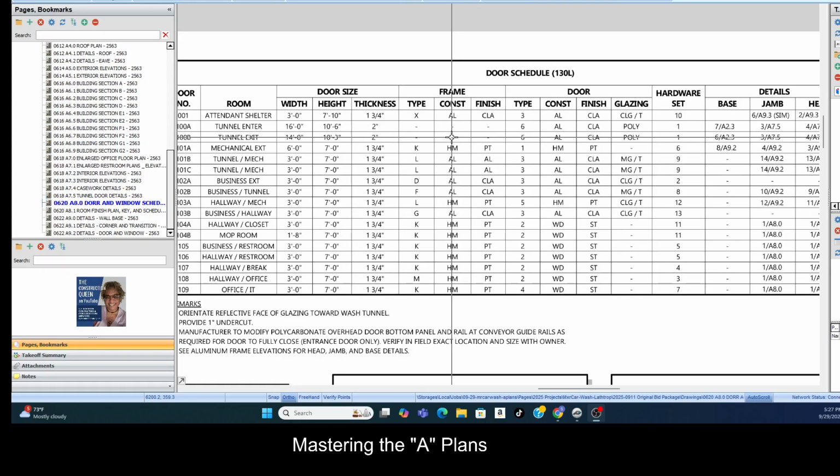If I'm the painter, okay, if it says paint, I need a cost to paint the frame, because that's a linear man-hour number when you're doing frames and trim, and there's more labor involved in that as opposed to just painting the door. And so yes, you need to know the frame length, right? Both sides of the frame.